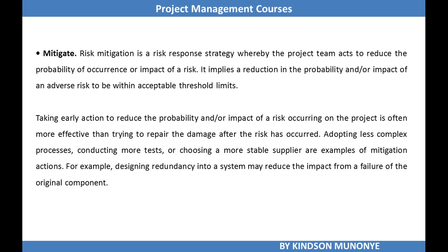Let's say a generator that will always trigger when there is power outage. So what you are doing is that the risk is there. The power outage might actually occur, but if it occurs, the generator takes care of it by automatically switching on, and you have your equipment in place. So mitigation is a very important aspect of risk strategy for managing negative risks.